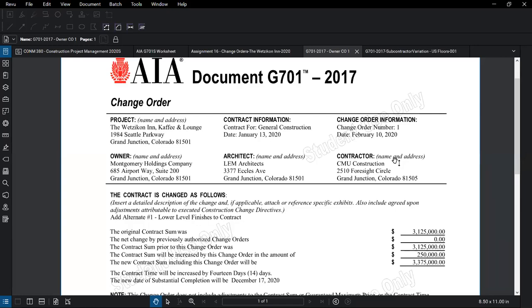That was one question that was always asked, at least when I was coming out of school. Well, if you've got multiple subcontractors, shouldn't you just keep numbering 1, 2, 3, 4? No, you have a sequence for each contract, 1, 2, 3, 4, and so on and so forth. So that's essentially the preamble information here.